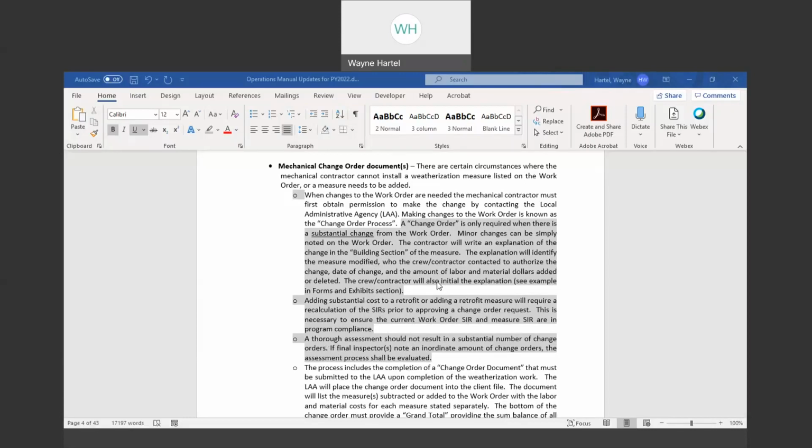Yeah, and we just want you to act like a prudent person. Adding $100 to a furnace install, or $150. So we forgot a condensate pump, and the guy's already got the old furnace torn out, starting to put in a new one. Things like that, I don't consider a substantial change, and we need to approve that change order and move on. Adding $1,000 to the cost of that furnace, well, that's a little bit different.